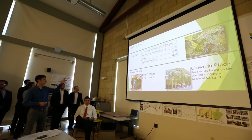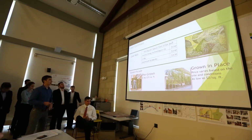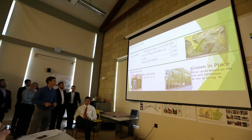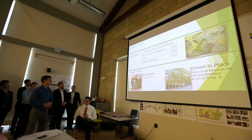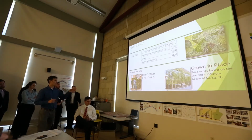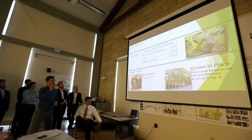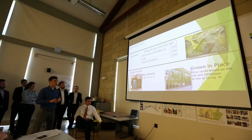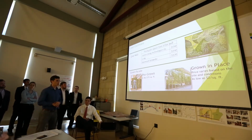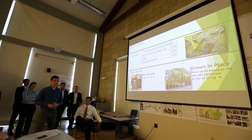The prices I came up with for live walls, which include buying them, installing them, vegetating them and everything, range between $120 and $150 per square foot. Then I did some estimating for green facades. If you're into immediate gratification, you can go with pre-grown at $75 per square foot, or you can grow it yourself on any structure, and that gets cheaper. Like this one was done in Chicago, I think at the zoo, and they planted at the bottom of the structure. It was $2 per square foot. That's very cheap.